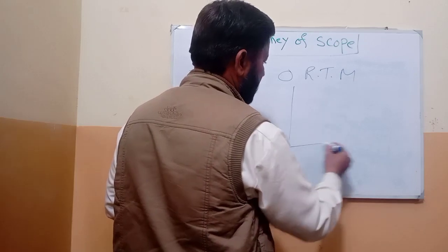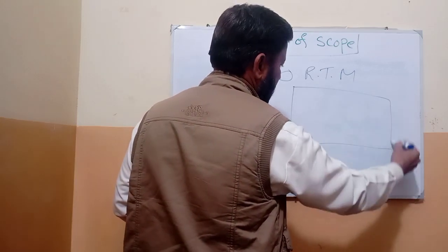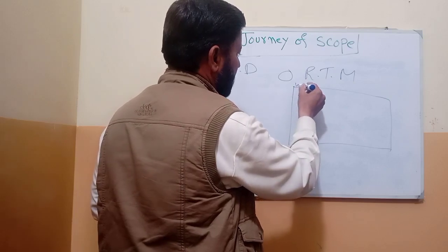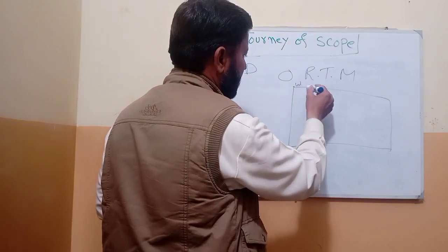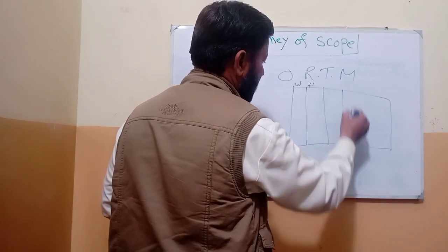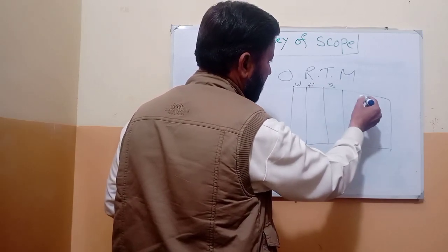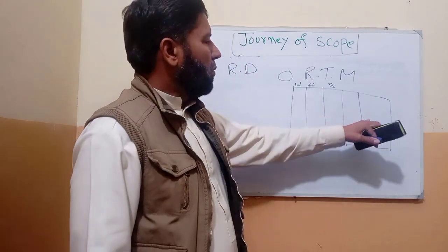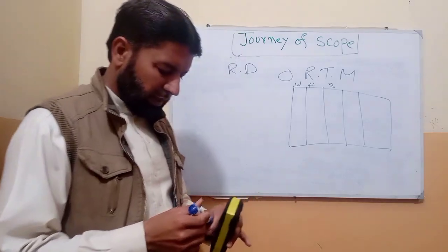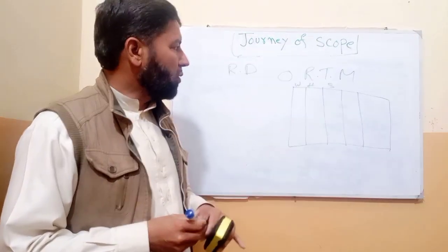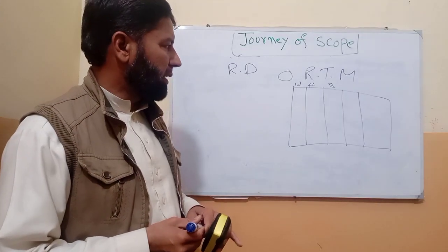We will make an Excel sheet and put who submitted the requirements, who is the owner of the requirement, what is the status of the requirements, and how we will check the linkage of the requirements from start till end. This is the requirement traceability matrix.